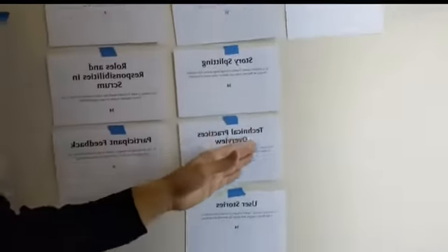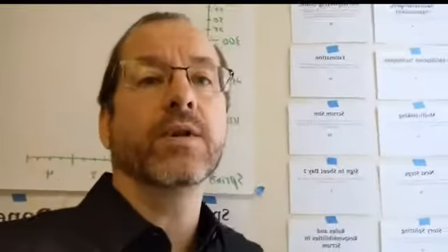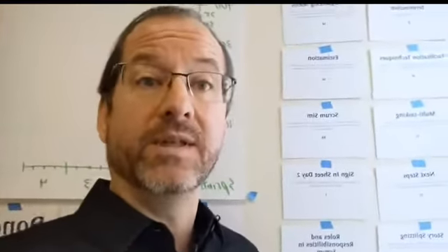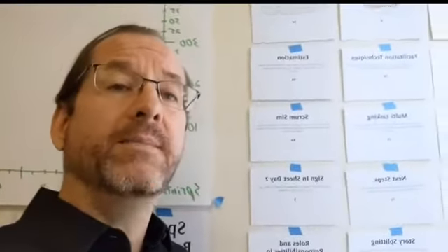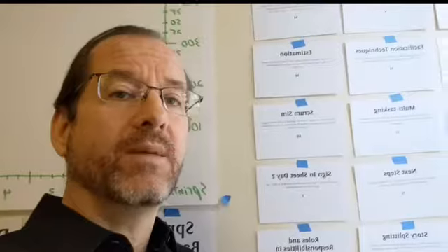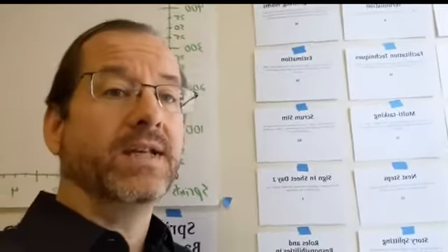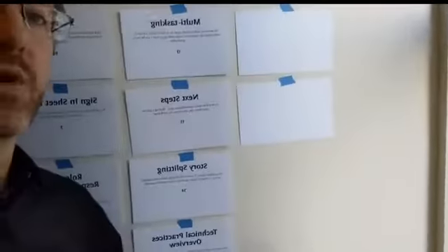But then over here, we've got a number of elective topics that the participants are going to get to vote on over the course of the workshop, thus doing business value estimation. And we will be adding those in at the end of the workshop based on available time and what they identified as most valuable.